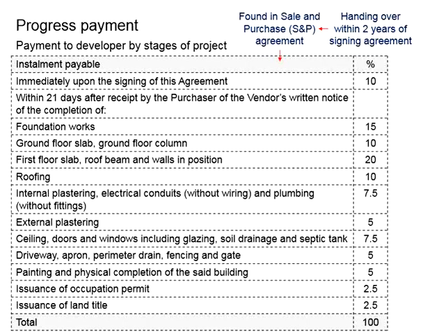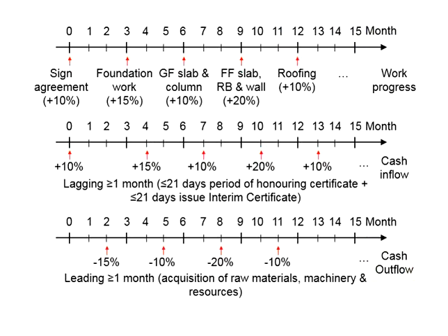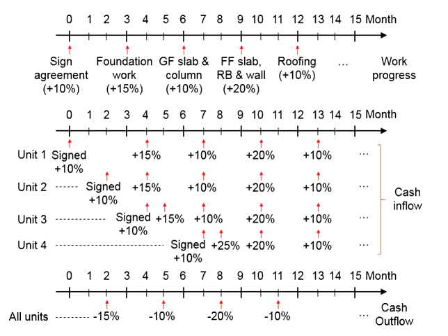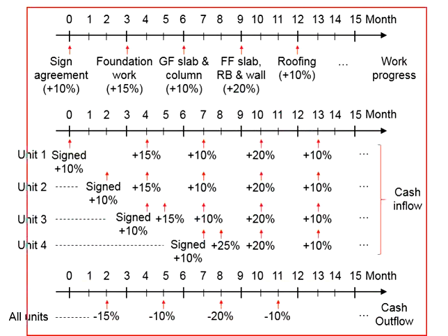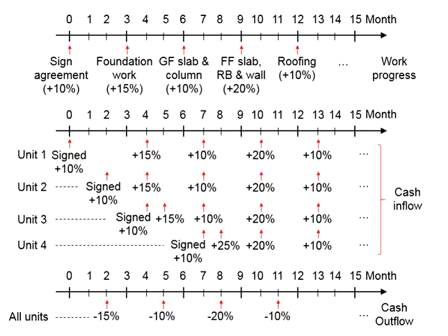developer and the buyers. As for the cash outflow, the spending will be leading, as you need to acquire the materials, machineries and relevant resources upfront before the respective work starts, so that the project activities can run smoothly without any gap. In these videos, we're going to discuss further the computations in terms of the cash inflow and the cash outflow as demonstrated in this slide. Let us first settle the easy one, which is the cash outflow.